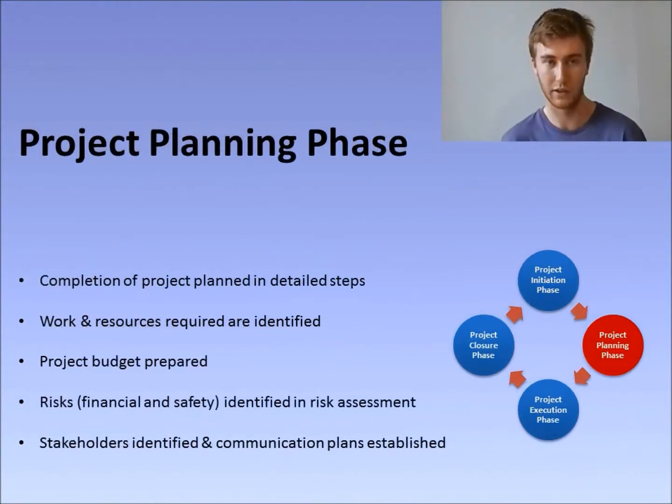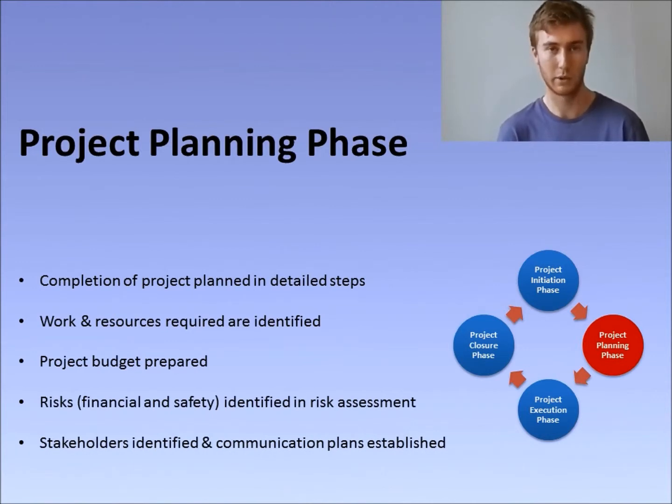During the planning phase, the completion of the project is planned in detailed steps. All work to be done and resources required are identified. The project budget will also need to be prepared, with cost estimates for labour, equipment and materials.